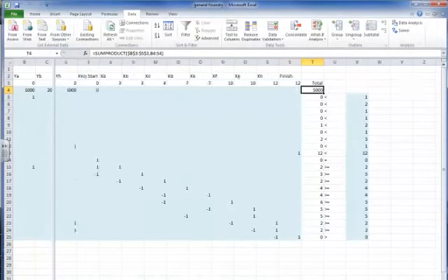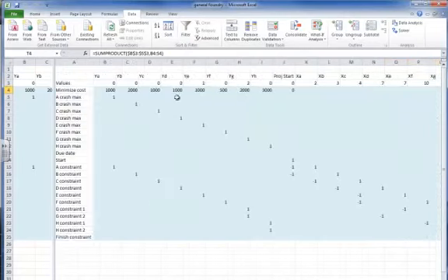And if I come back here, I can look at these variables and see it say that in order to crash this to 12 weeks, I've crashed task E by 1 week and task G by 2 weeks.